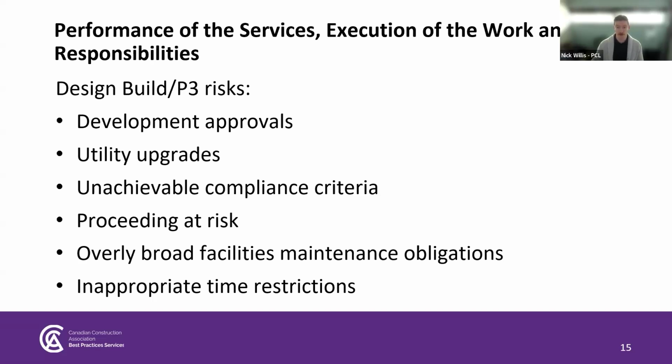Finally, inappropriate time restrictions. Increasingly, in P3 projects, contracts are including restrictions on the amount of time an area may be available for certain construction activities, without providing a corresponding means to increase those time periods. This creates the risk of a hair-triggered default that cannot be remedied by the contractor.